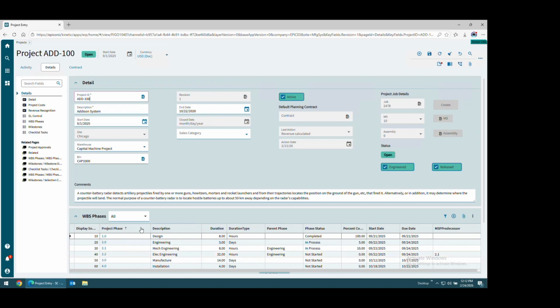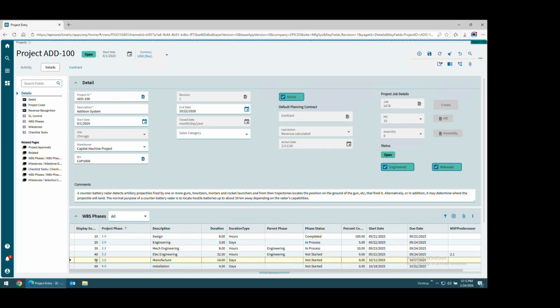Each of these phases, you have the ability to establish estimates or budgets based on the hours that are expected, also on materials, specifically anything that relates to manufacturing efforts. You can associate a manufacturing job to a project phase, which will then roll up all the bill of materials information, all the labor associated to the routing details of things that are going to go through the floor. They can be collected against that specific phase. So this is how we relate it all.